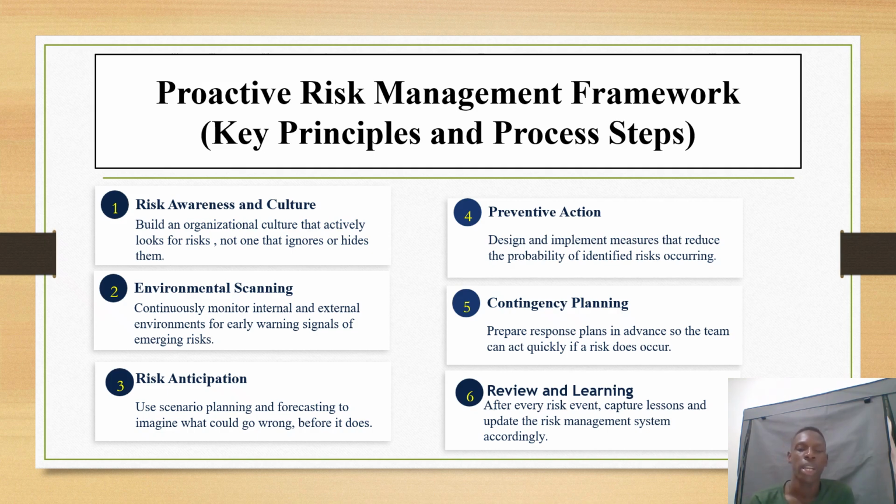Then environmental scanning. You have to continuously monitor the internal and external environments for early warning signals of emerging risks. In case there are warning signs, you act early. Then risk anticipation. Sometimes you use scenario planning to imagine what could go wrong before it does, so that by the time it comes, you're already aware and take action earlier.